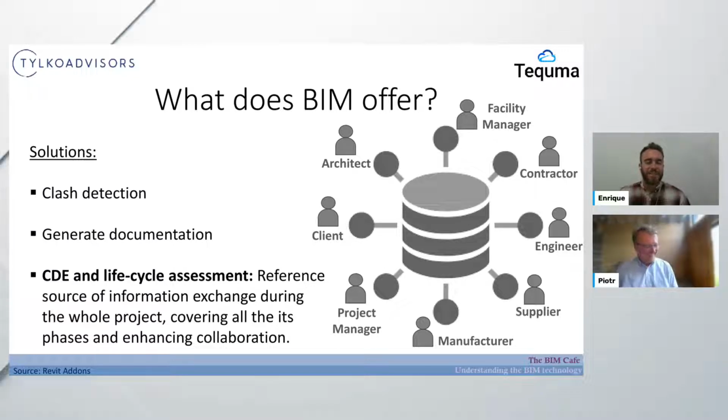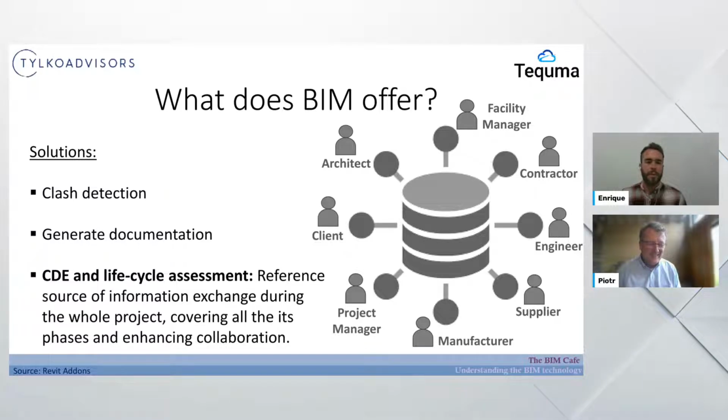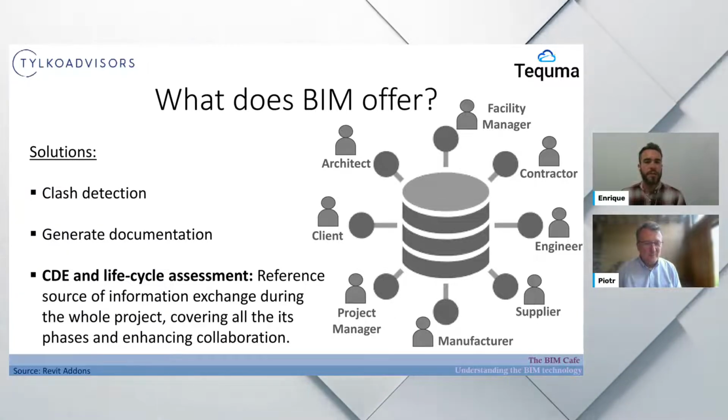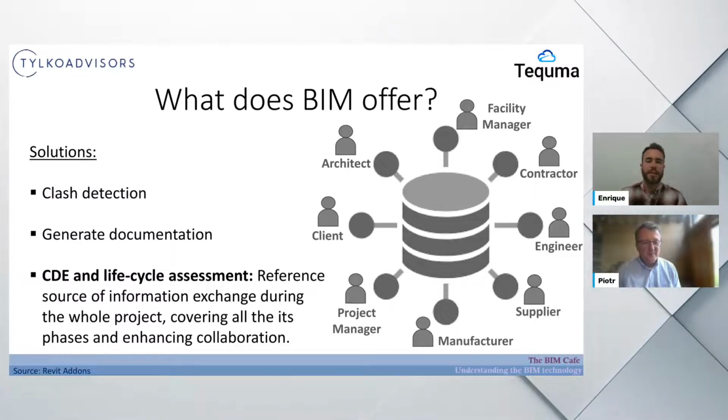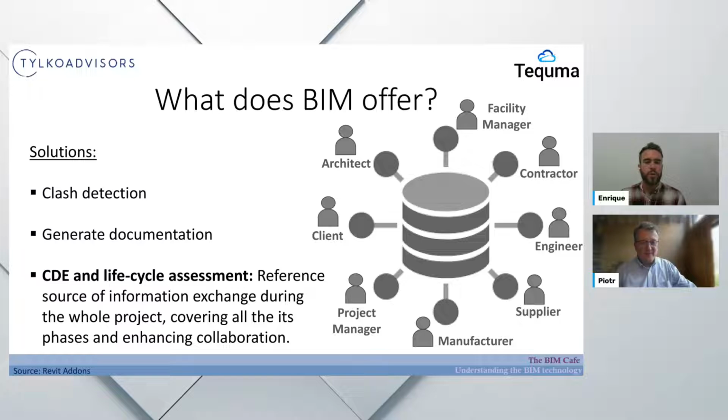This is a similar concept, a common data environment. Let's imagine a cloud or a methodology, which can also be BIM, where all the data is shared. If you need references, you need information, you go to the same place. It's the unique reference source for the information, where everyone, like the directors of a project, contractor, engineer, supplier, and so on, and many others can be part of this common data environment, or CDE.